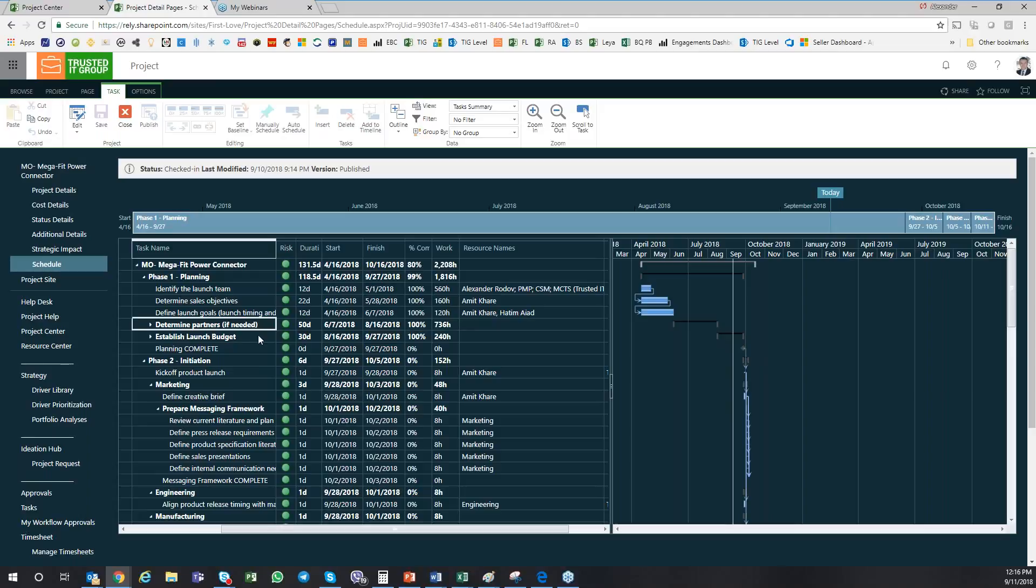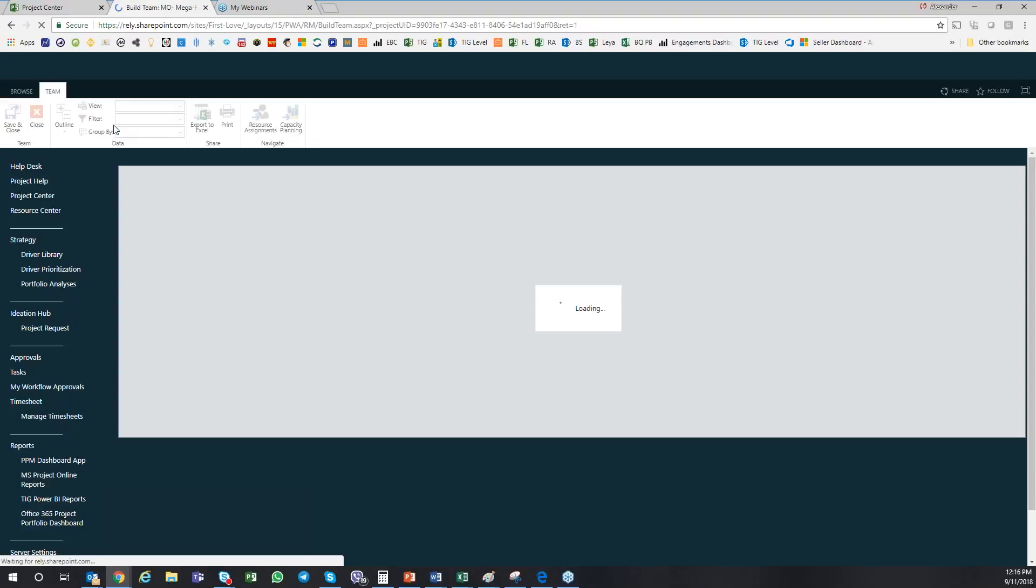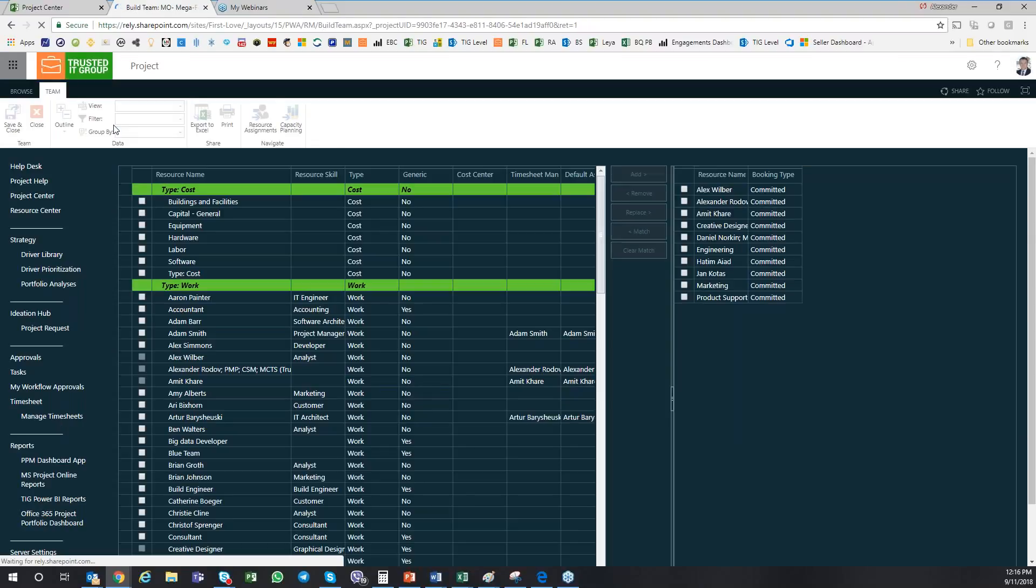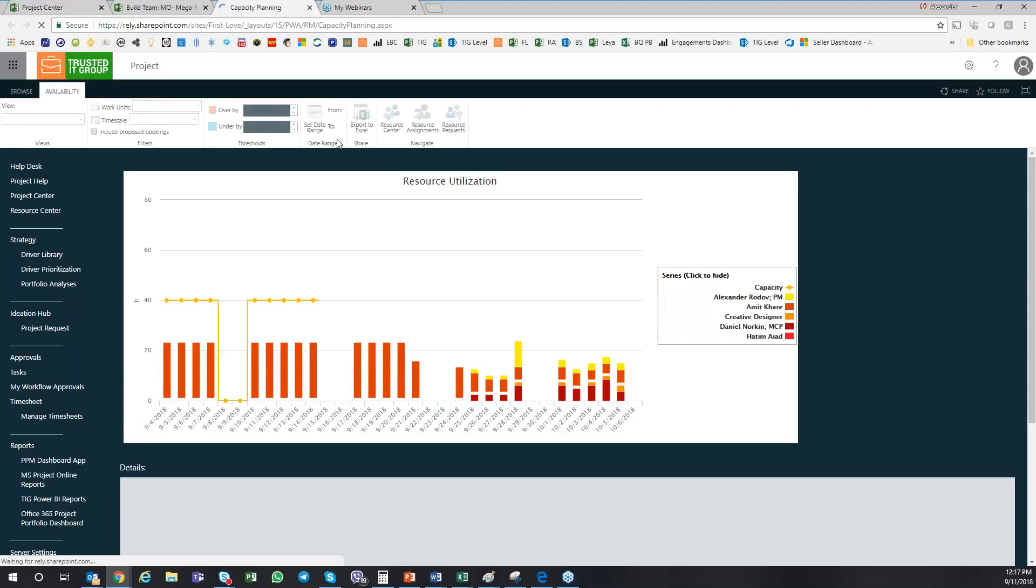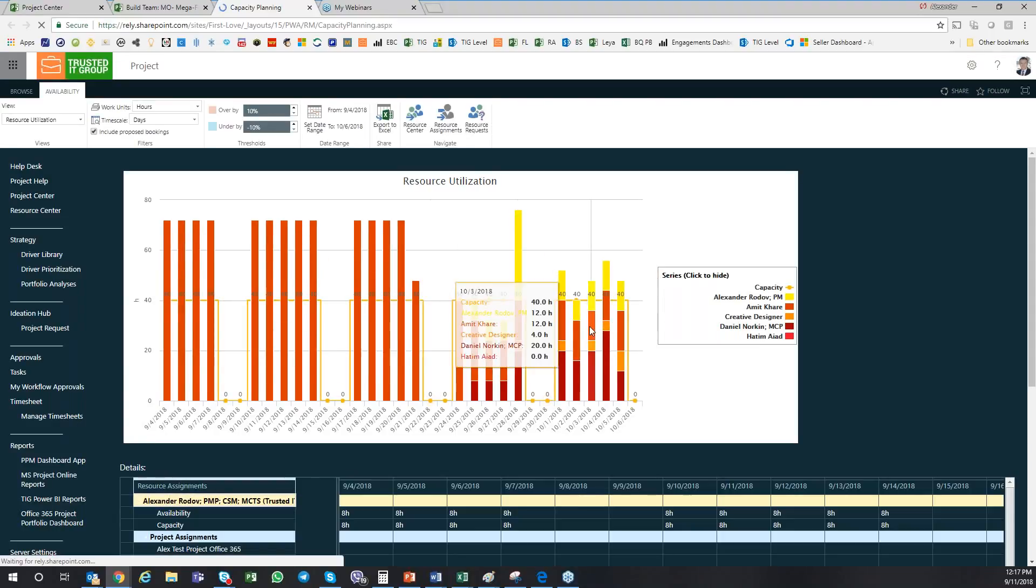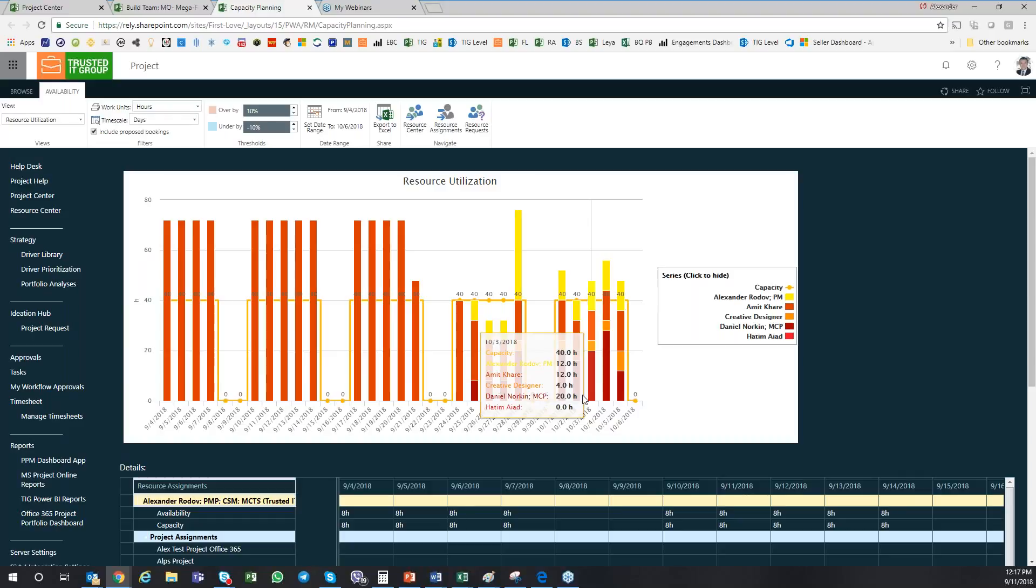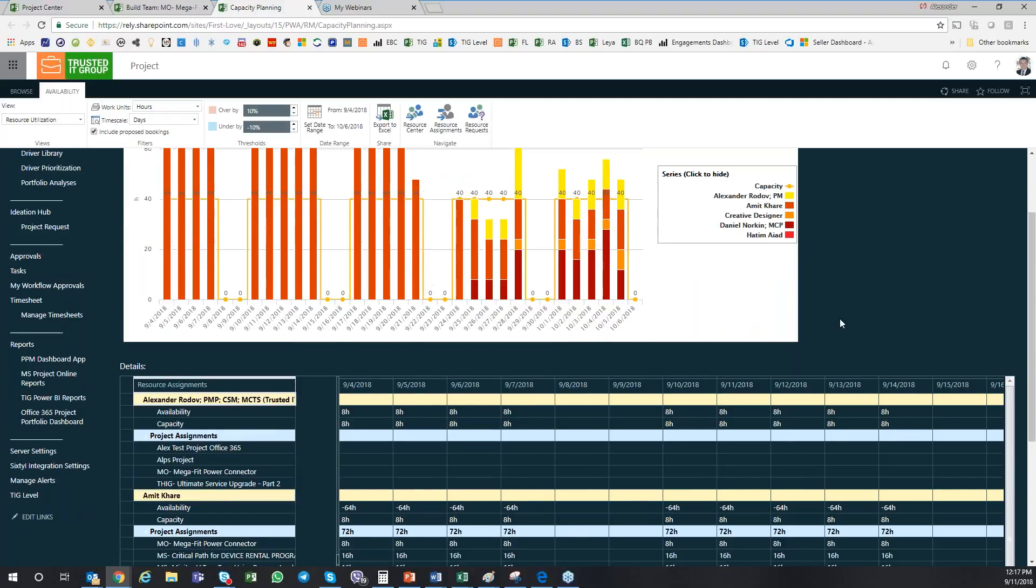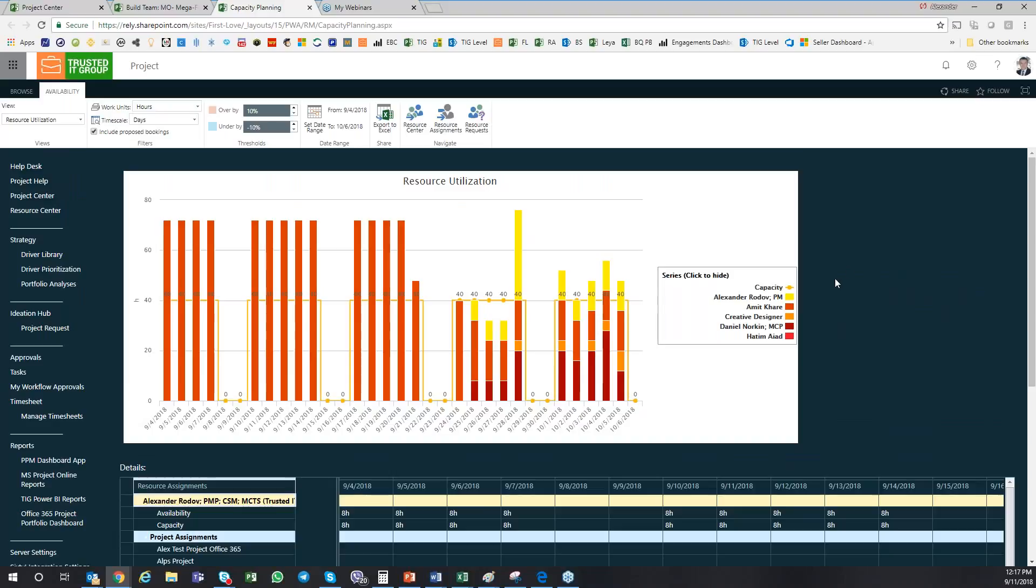In this case, you can see the Gantt chart, you can see the resources, you can actually have some custom fields and calculated fields. So you basically would manage your project as you would manage this project in MS Project. Here you can also add resources. This is also where you can look at the different resources that you have on your project and quickly run some of the resource analytics like capacity planning, see how your resources are under or over utilizing the projects. We can quickly get to some of these charts, understanding that you have potentially over-allocating some of these resources where you may need to rebalance your resource load on this project.